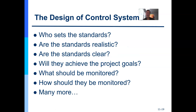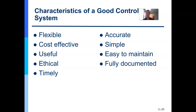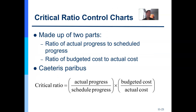We want to have a design control system to understand how the project will be controlled. I create a change control board — through me as the project manager, I'm wholly responsible. I set the standards, make them clear, address who has voting rights on the panel for changes, what we expect to achieve, and what we're monitoring — listing all the management plans. Every management plan is how I'm going to do something, focused mostly on control. Key questions: Is my deliverable useful? Is it cost-effective, simple, accurate, timely, flexible, and documented along the way? We'll finish up chapter 11 right after this break.